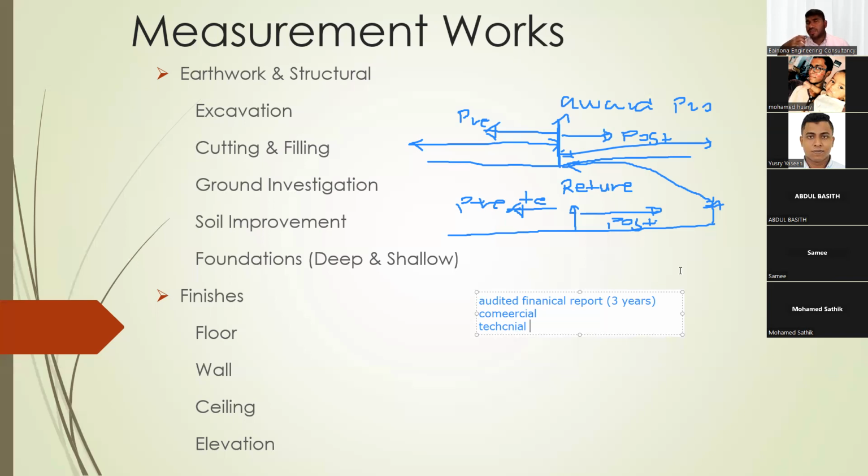Now, interestingly, that has come to companies as well in UAE, Abu Dhabi especially. Two or three days ago, I sent a pre-qualification questionnaire to the contractors asking them to give an Etihad Bureau credit risk report. The company has to go to Etihad Bureau. They cannot influence that. They have to pay 20, 100 or 150 dirham to Etihad Bureau to take a report from them. They have to put it in the technical submittal and give it to us. Then we will see how they are performing financially, how many cheques bounced previously, how many suppliers complained. Many things will be mentioned there. From there we can decide whether we can give this project to this contractor or not. These are all quantity surveyor duties.